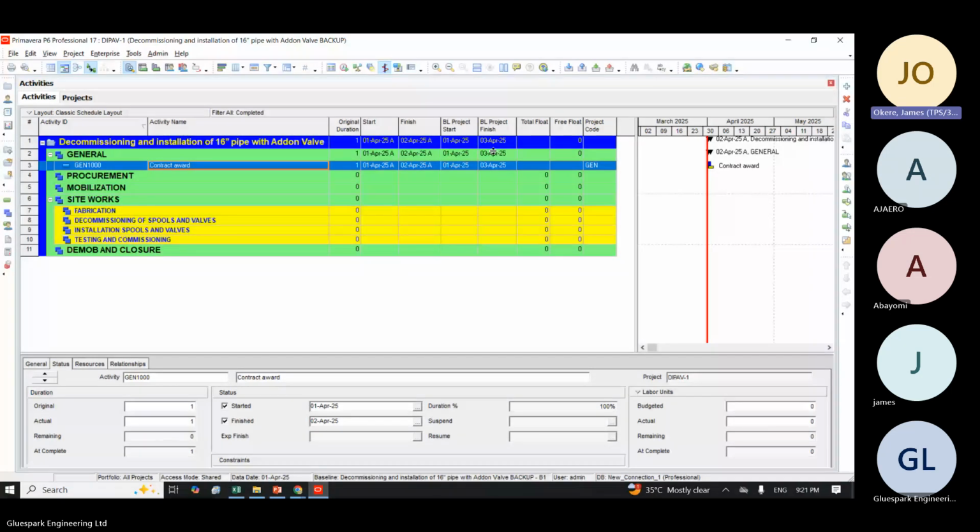It means anybody walking along the road, you just generate one milestone, you complete it, and you report that you finished that job. But you did not plan for it. It's not part of your target. It's not part of the plan at the beginning of the year. So if you are to score them, if you do 21 divided by 72, you find out that they did not pass. But they were able to complete 70 something. The reason is that they are doing a job, good and fine, but it's not part of the milestones for that year.